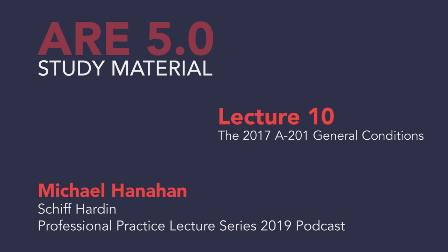3.7.5. If a contractor encounters human remains or recognizes the existence of burial markers, etc., etc., the contractor shall immediately suspend any operations that would affect them and shall notify the owner and the architect. I have not had this come up personally, but I represent a client who did. When they were building McCormick Place, the original building right on the lake, when they were digging the foundations, they found Indian burial grounds underneath. They had to stop, and then you have to investigate what it was. At the time, they just found remains. They didn't know it was an Indian burial ground, but then they brought the tribes in and they were able to figure out what to do with it.